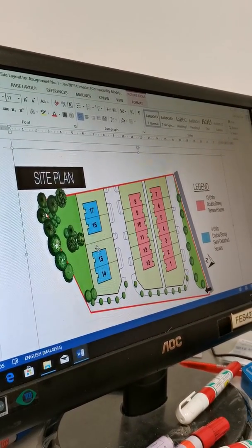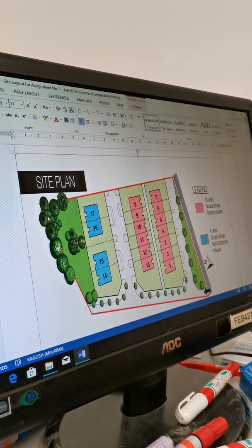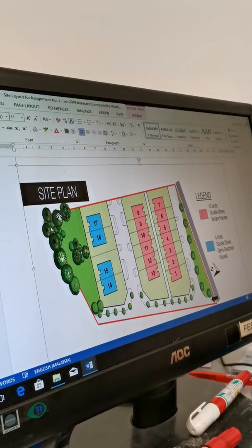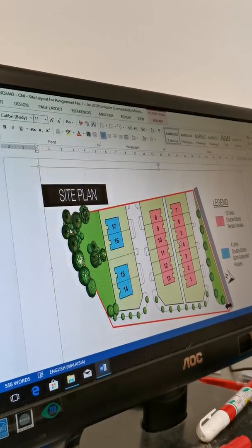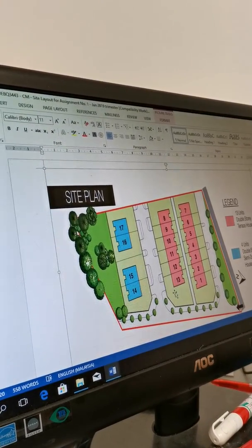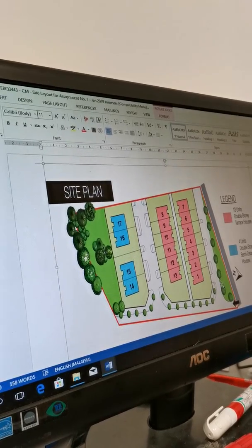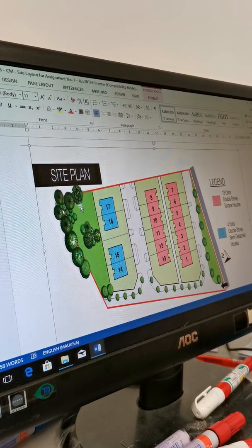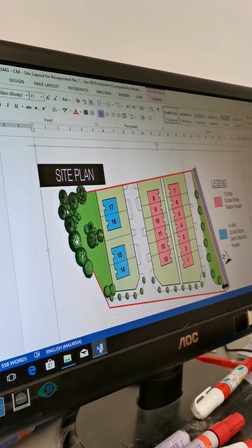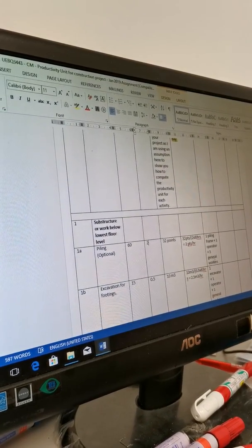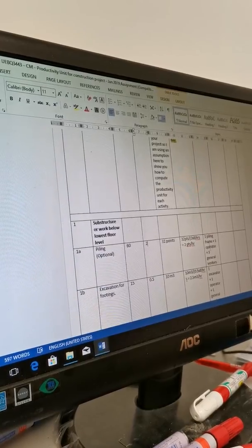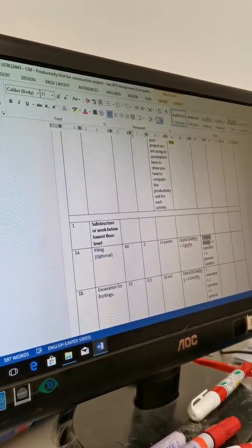Let's say for your mixer, you cannot have 17 mixers if there are 17 units. Clear? Then maybe per block here will be 1, 1, 1, and so on. So your mixer. But people-wise, if it is 17 per unit here, let's say I have 3 general workers and 1 so-called operator. These items are interlinked.